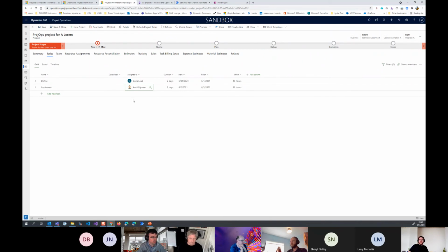This is, I would say, a pretty good example of the complexity in bookings in general. The concept of booking someone and the concept of assigning someone are two different things. We book someone on a project: hey, you're on this project for a year. That does not necessarily mean that person has assignments on specific tasks.